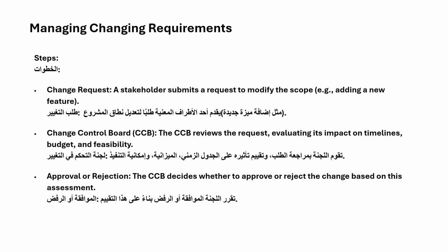It's like there is a template or a form that the user has to fill in to specify what they need to change or what they need to add. Then the company usually has a team to review those customer requests, which we call the change control board. They identify a group of people at the company so that all of those change requests will be reviewed by the CCB, the change control board.